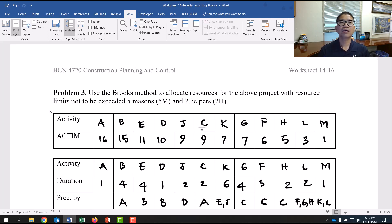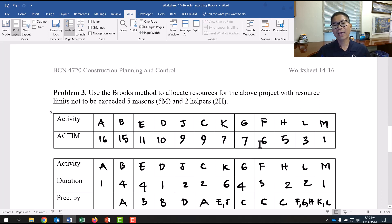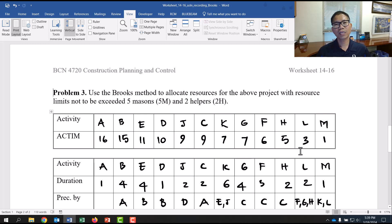Rank the activities from the highest active to the lowest. A goes first, then E is next with active 11, compared to C at 9 or D at 10. So you put E before C and D. Rank by active value and put them in order from highest to lowest active as shown in the first two rows of the PRO table.